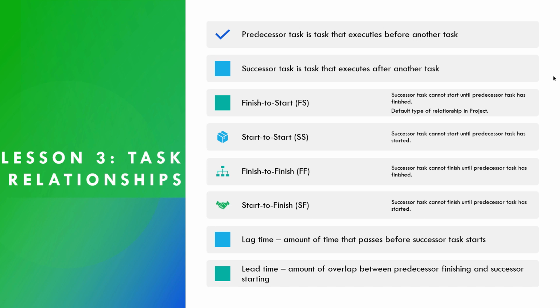We need another day after the last day of painting to make sure the walls are dry before the next task can start. We don't want to make paint walls a 4-day task because then the project will be charged for 4 days of resources that are not working while we're waiting for the paint to dry.